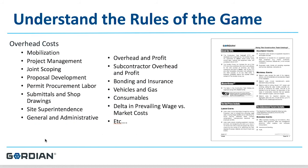Overhead costs to consider when calculating your adjustment factor include mobilization, project management, costs for joint scoping of each project, proposal development time, permit procurement, submittals and shop drawings, your site superintendent, and general and administrative expenses. Your overhead and profit needs to be in your factor, as well as your subcontractor's overhead and profit, your bonding and insurance, vehicles and gas, consumables, the delta in your prevailing wage versus market costs, and other expenses.